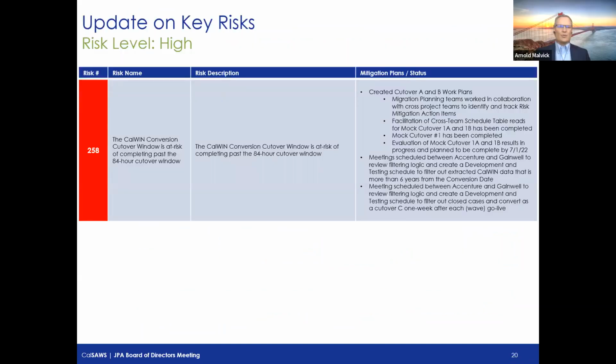Yeah, that is correct. Another point I will make as Rachel and I discuss these risks is that we're going to frame them in the context of our status for wave 1 versus subsequent waves. In future updates, we will actually update the risk to give a stoplight, an amber, red, or green status based upon wave, because we're going to see different levels of risk based upon the wave status.